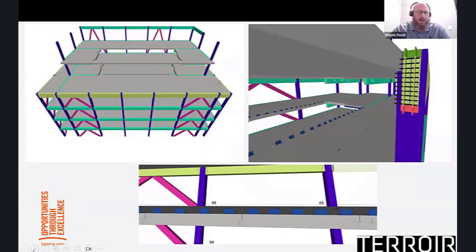And then DFMA, as I mentioned before, one of the key reasons why we're able to get 2 different CLT suppliers from Australia on this project and the glulam all the way from Germany was because we did the LOD 400 model independent. So everyone worked from our model. We're able to, as you saw before, do the studies of the order and sequence. So we're able to then figure out exactly the direction of the halflap joints, what connections were done by whom, the penetrations, all of that was modeled by us. And then basically it went out like a kit of parts where that was made in Germany, this was made in Albury-Wodonga, this was made in northwest Tasmania, all coming together to 1/10 of a millimeter tolerance on site for a great outcome on the project.